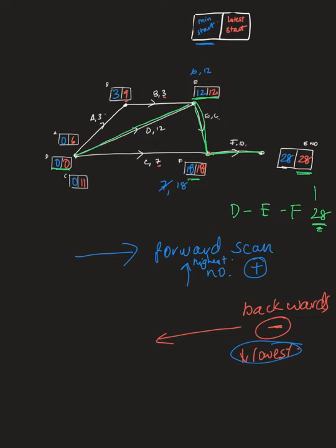Minimum completion time. The other great thing about this method is each checker box will show you the slack time. So for example, if we have a look at activity B up here, the minimum start time for activity B is 3 after 3 days, weeks, whatever the time frame is.